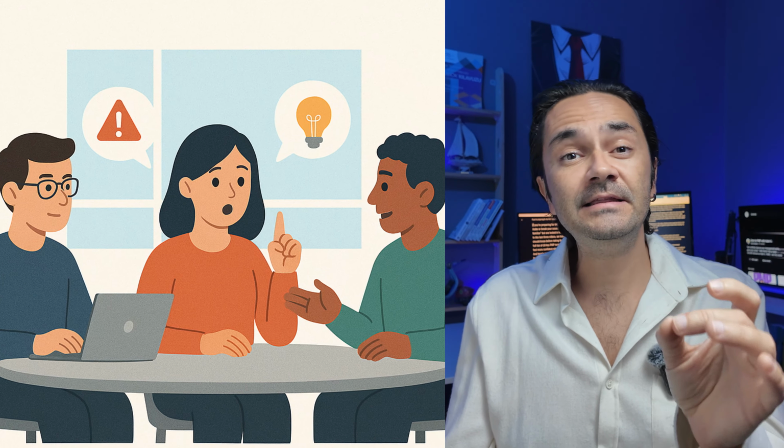The goal of the meeting is not to solve problems right away, but to quickly share updates and mention any issues that need attention. If something needs more time to discuss or fix, the team talks about it in another meeting after the daily scrum. So, for instance, if one person says they are stuck because of a technical issue, another team member might offer to help right after the meeting. This way, small problems get solved quickly and the team keeps moving forward together.